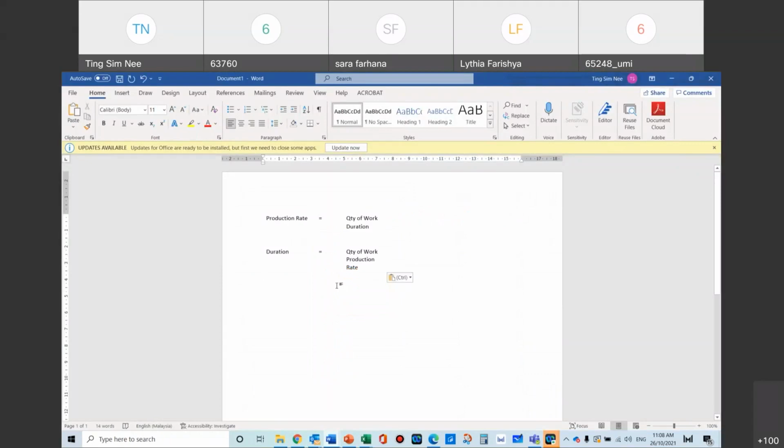So this will be our formula that we are going to be using a lot. Because to do a schedule, you need to know all your resources, because there is a production rate associated with it. With that quantity of materials, you will start to see the work that is required, and the work that is required will be part of that formula. And then with that duration, this will be the duration for your activity. So this is the beginning of planning for time.